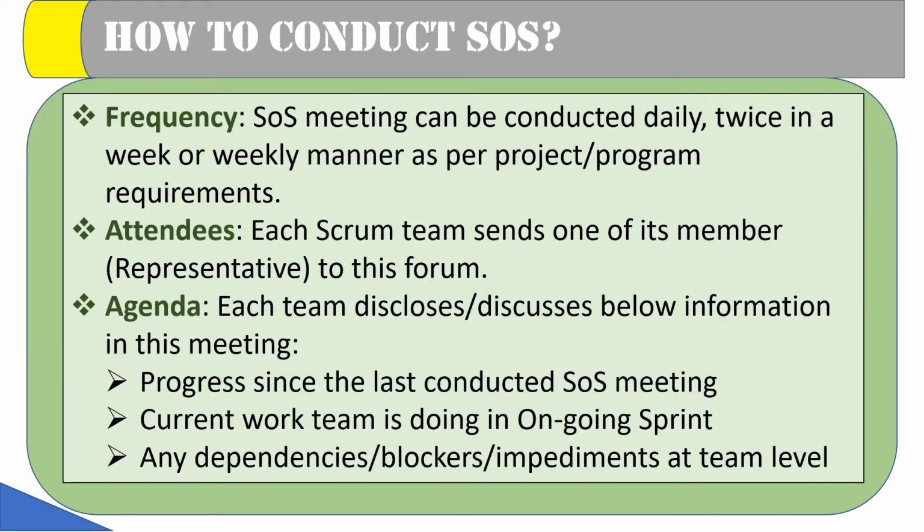Now, how to conduct the SOS meeting? The first thing is the frequency. This meeting can be conducted daily, twice in a week, or weekly as per project or program requirements. From a Scrum process perspective, from an Agile perspective, there is no hard and fast rule that this meeting needs to be conducted daily. It all depends upon the project and program requirements. I've been part of a project where we used to have it twice in a week.